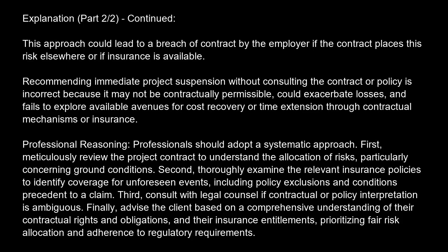This approach could lead to a breach of contract by the employer if the contract places this risk elsewhere, or if insurance is available. Recommending immediate project suspension without consulting the contract or policy is incorrect because it may not be contractually permissible, could exacerbate losses, and fails to explore available avenues for cost recovery or time extension through contractual mechanisms or insurance. Professional reasoning.